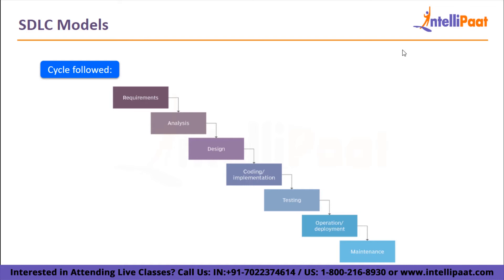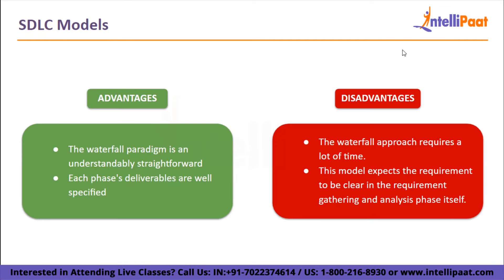Bug logging, retesting, and regression testing continue until the software is ready for use. Following customer approval, the developed code is put into production during the deployment phase. Developers are responsible for fixing any problems that arise in the production environment under maintenance. The waterfall paradigm is straightforward — all steps are carried out sequentially and each phase's deliverables are well specified. However, it requires a lot of time and a new phase cannot begin until the current one is finished. Any change in later stages would result in higher costs, so it cannot be used for projects with uncertain or changing requirements.